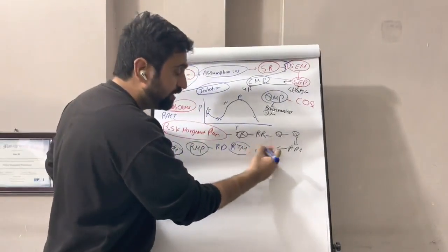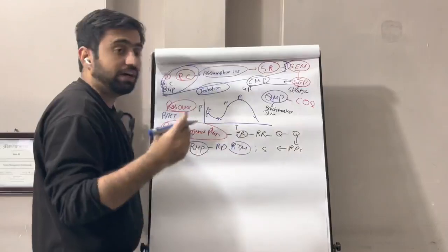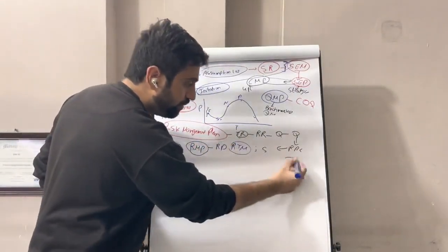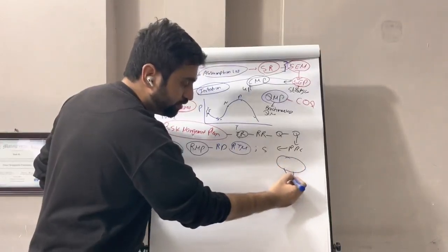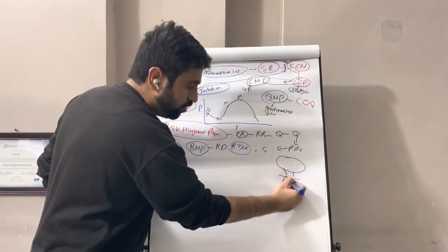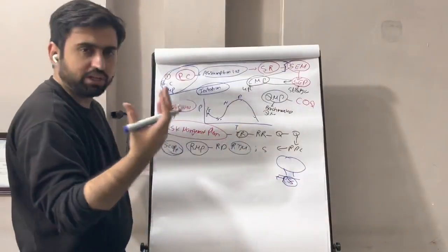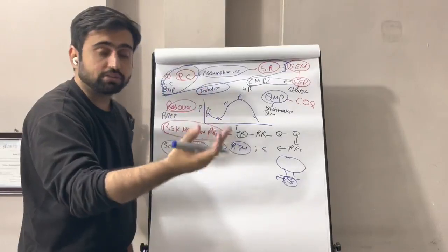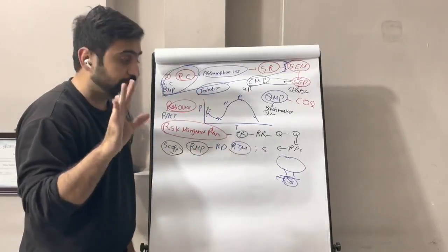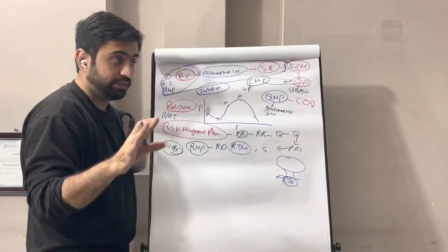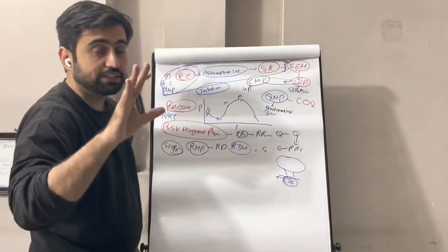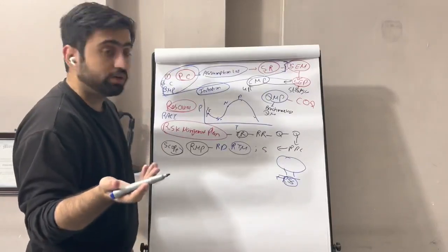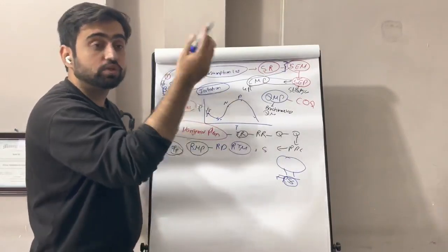Once this is done, we use the scope management plan to define the project scope statement. We have collected all the requirements. Now we put a filter on those requirements and we get the project scope statement from there. In the project scope statement, what is in the project, what is outside the project, what are the assumptions, what are the constraints, everything must be mentioned. Understand this. If something is not in the project scope statement, we don't make that, because those are the things that go to the scope baseline.